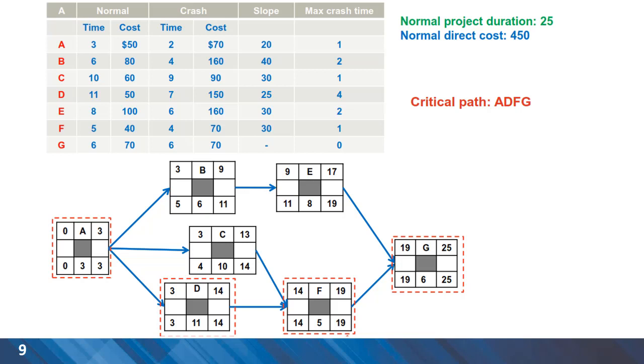We can draw the critical path of the project based on the logic given and activities ADFG are on the critical path. Any reduction of time on these activities can reduce the total duration for the project which is currently 25 days.